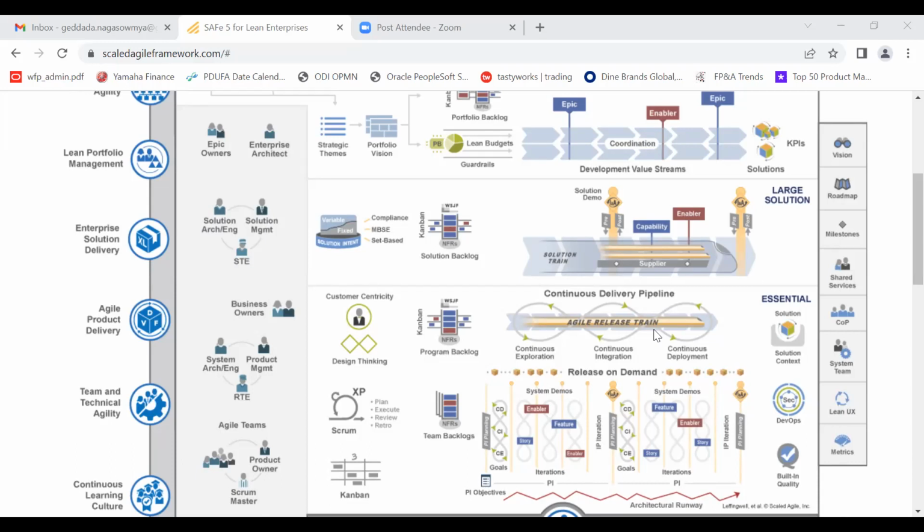But Ravindra's team is also working on Scrum, and my team is also working on Scrum, and Gupta's team is also taking the Scrum model. So within the team, Ravindra is the PO, I'm the PO, and Gupta is the PO. But we 3 POs sync at regular intervals, identifying the dependencies, eliminating the risk, making sure the release is going smoothly, and giving updates to the product teams.